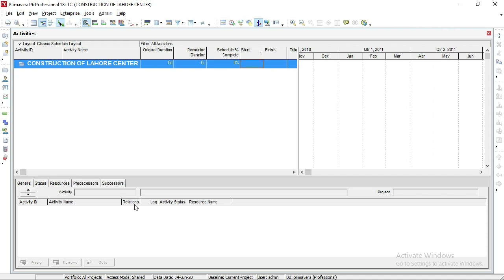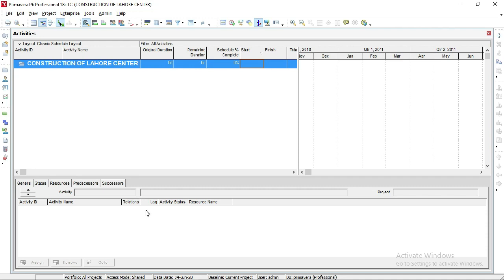Here are Activity ID, Activity Name, relations between activities, and lag. We will discuss resources in detail later. Lag is the delay between activities which is not acceptable in our project. Sometimes we relax some activities to allow a delay of two or three days, but if they delay more than that duration, this will be called lag.